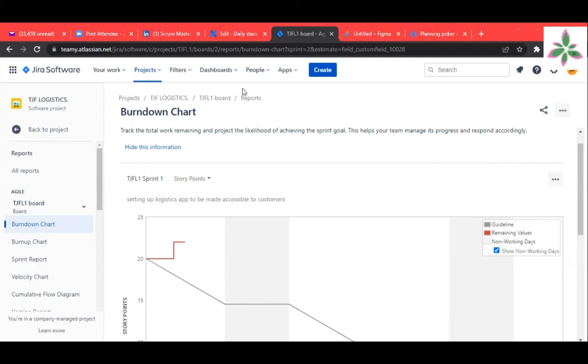So I was expecting that your user stories would go like this. As a passenger, I want to blah, blah, blah, so that blah, blah, blah. As a driver, I want to blah, blah, blah, so that I would blah, blah, blah. As an admin, I want to blah, blah, blah, so that I will blah, blah, blah. As a trunk user, I want to blah, blah, blah, so that blah, blah, blah. You did not; you lumped everything as a user. Who is the user? We don't know.